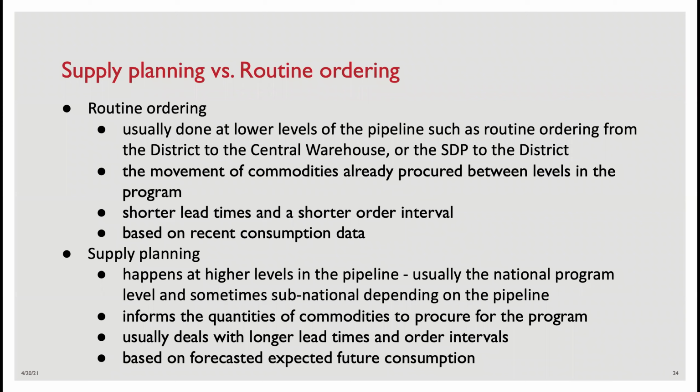On the other hand, supply planning is for the higher levels, certainly at the national program level, but possibly at the subnational level, if any of the lower levels are responsible for procuring their own products. Supply planning relates to procuring for the program and not individual facilities. There are usually longer lead times and longer order intervals for supply planning, and the supply plans are based on future expected consumption, not recent past.